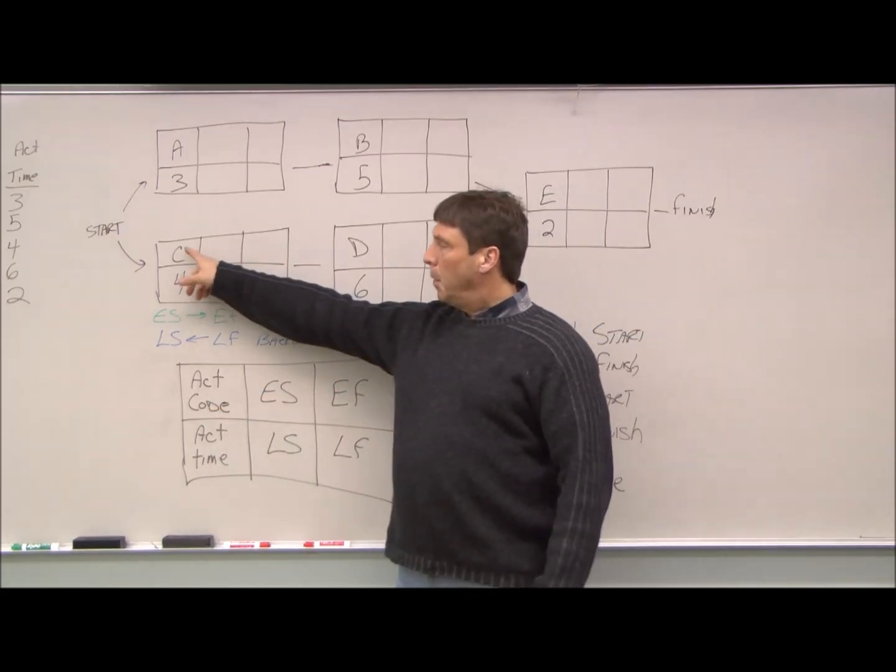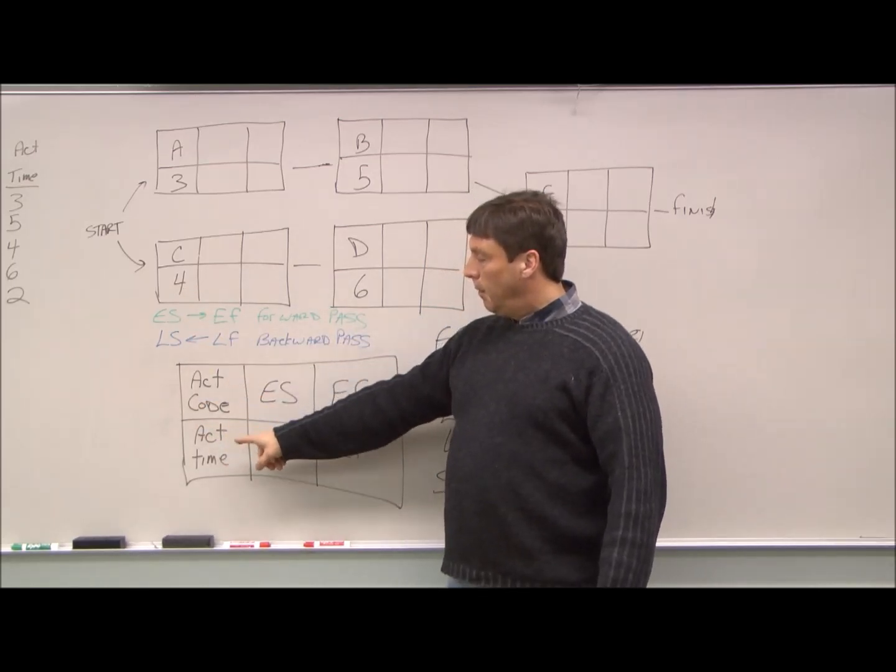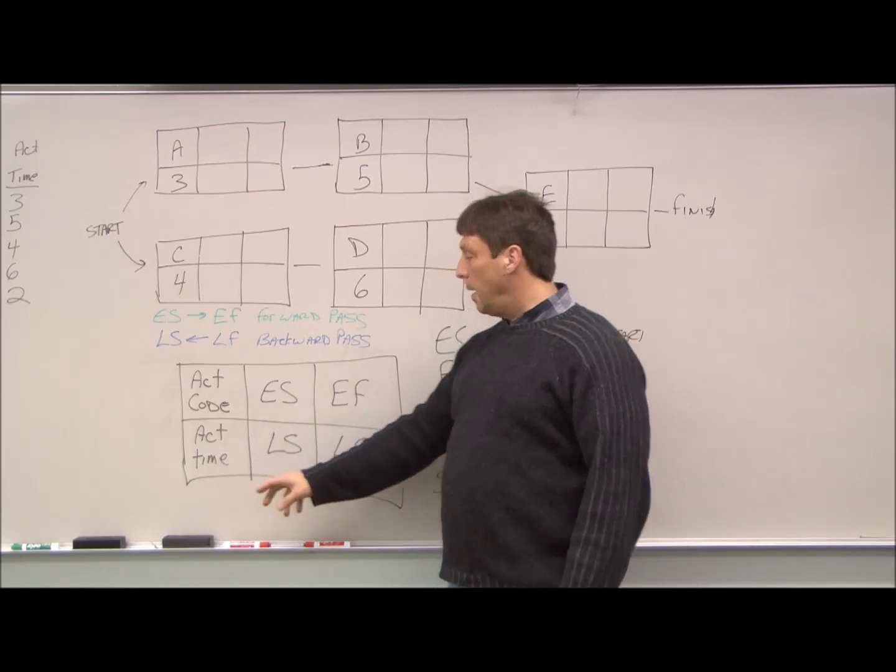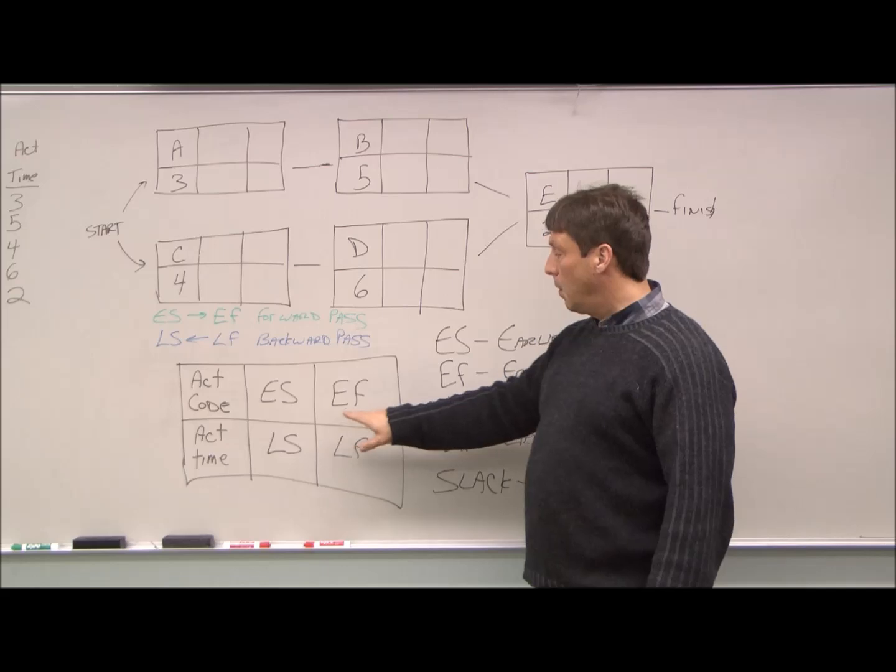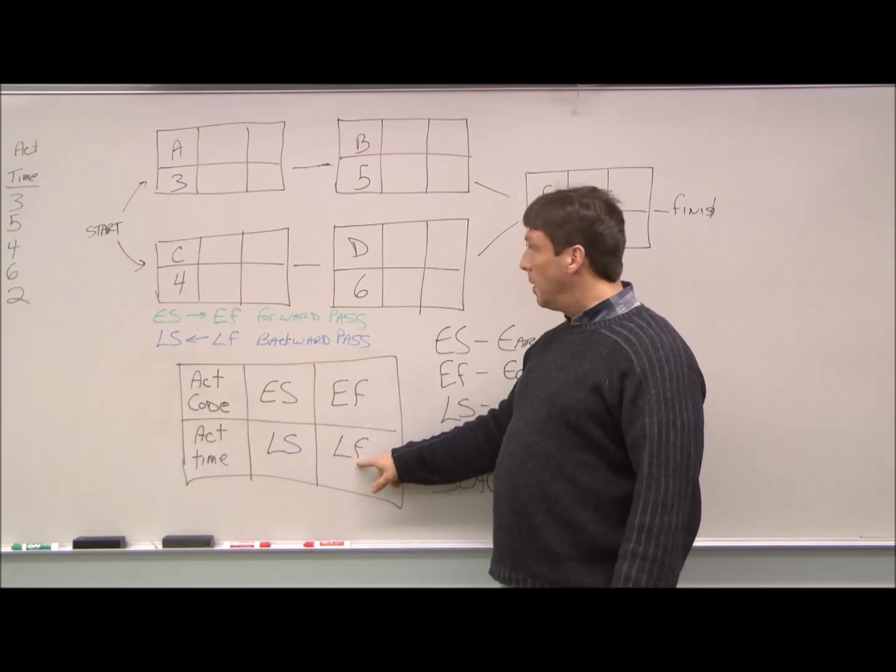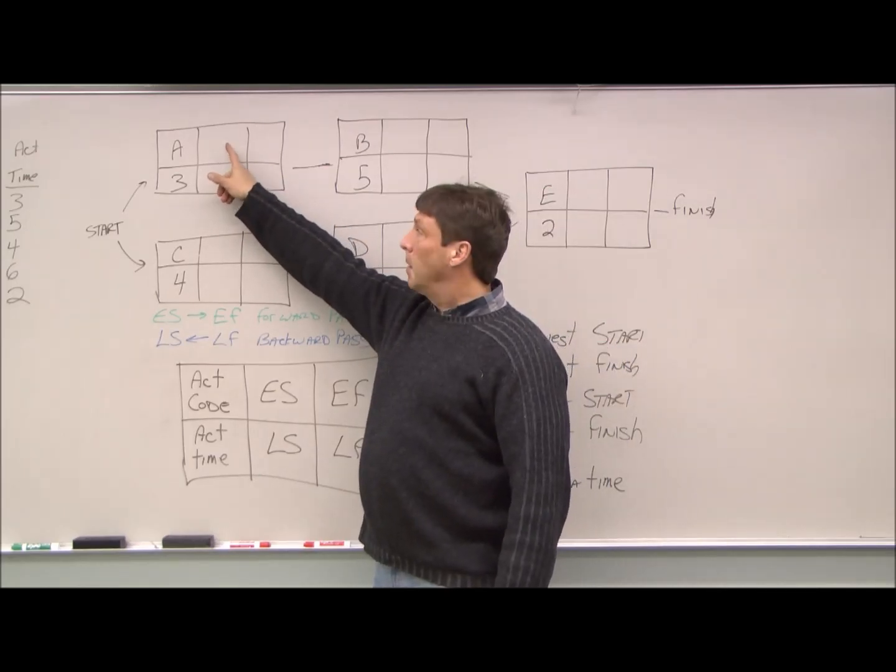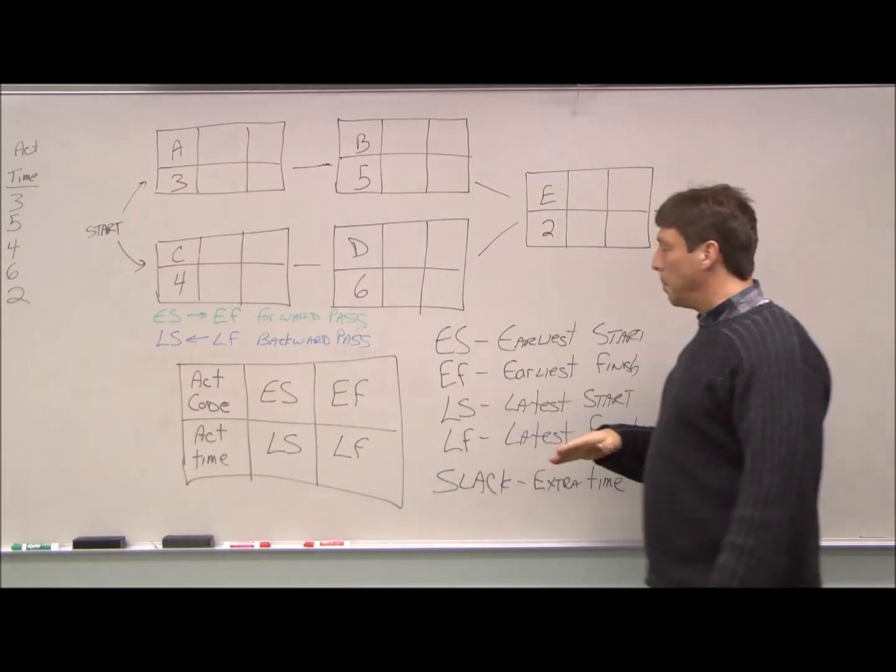You notice before we were just working with the activity code and the activity time. So the activity code and the activity time, they go on the blocks on the left. The top row here is our earliest start or earliest finish. The bottom row is our latest start, latest finish. So we have to come up with the earliest start and latest start and finish for each one of our blocks.